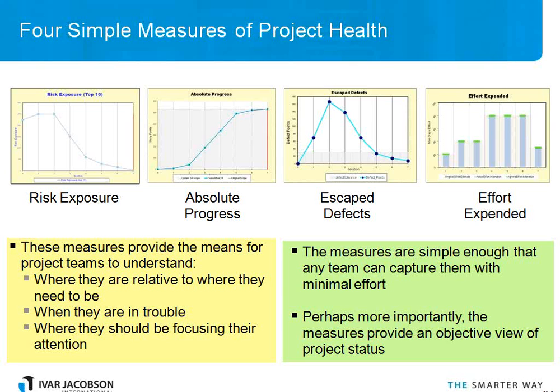And to do that, we then needed to think about and replan our project. We could either get more of their time, or we could halve the scope, or we could extend. So we could take action based on those leading indicators of success and failure.